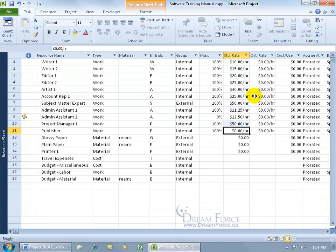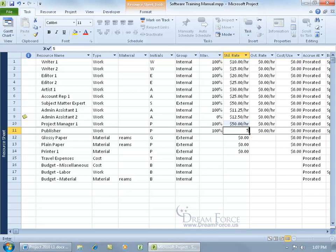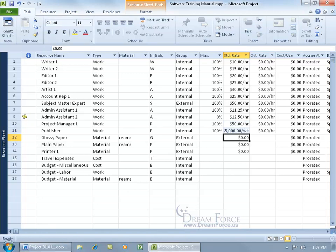Now up until this point, I've only entered in hourly rates. If you have a weekly, monthly, or yearly rate, then just go ahead and do the following. Just type in the amount and then do a forward slash and then type in WK for weekly, MO for monthly, or YR for yearly and then go ahead and hit enter and there you go.